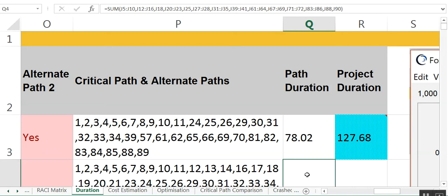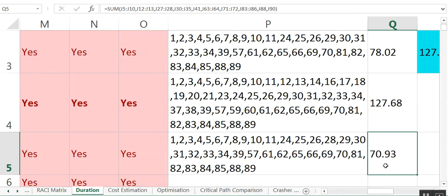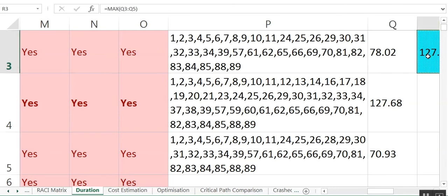Now we look at the second lot. Again, we can see what they've done there with their alternate path, etc. Now, to create the crystal ball, what they've done is they've looked at these alternate paths. We know this is most likely going to be the one, but we're not too sure. So we run all simultaneously by using a max function, which means we go back and check all those, and we can then determine which one is the longest. So that's neatly done.